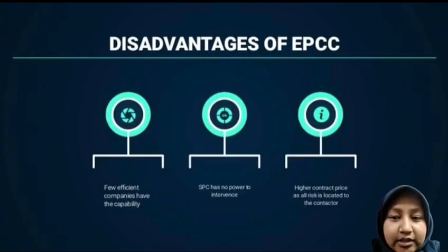I will explain the disadvantages of EPCC. The first is that few efficient companies have the capability and are willing to participate in an EPCC contract. Therefore, the contract price is not competitive and the contractor can set the price.